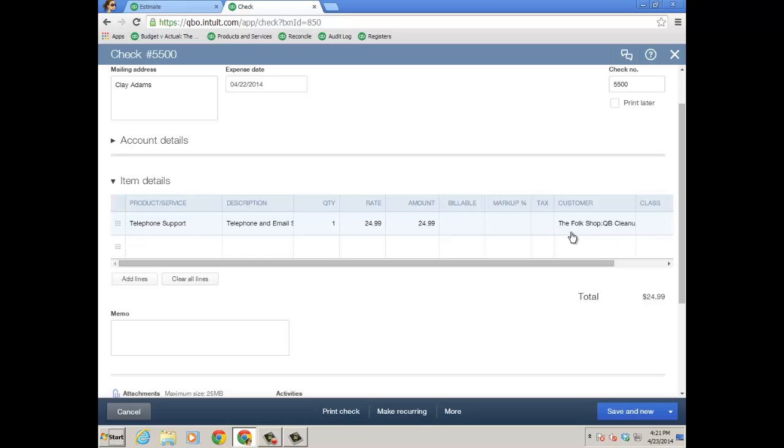guess, did this one. I'm clicking on the customer. Notice it looks a lot like in desktop, parent, sub, which is the job, but it's a sub customer. Notice the billable box I am not checking. Why? Because the customer already accepted the estimate, the contract. So I'm not going to actually send through more and add it to the end. I don't want to duplicate bill them, right?